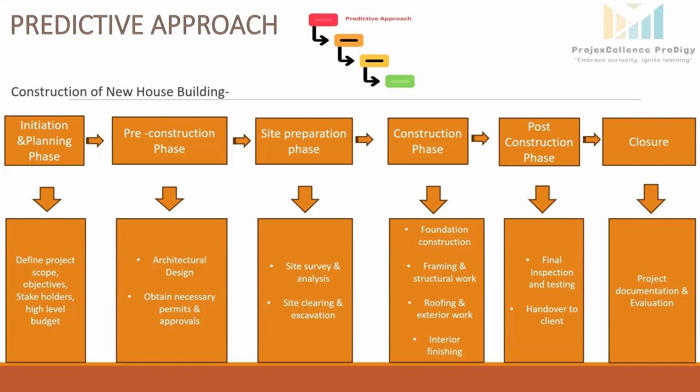Last phase is the project closure. In this phase, the project team and the machinery will be demobilized from the site. They will create the project documentation and they will record the lessons learned register, which will help them for their future projects.